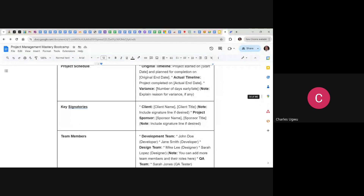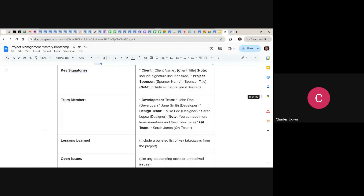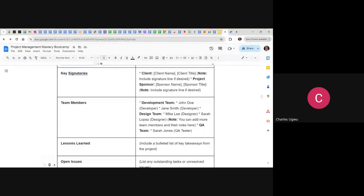Then, key signatories — who authorizes this project? Capture the client's name, title, and signature line if desired, and the project sponsor's name, title, and signature line. Then capture all team members who participated. Under the development team: John Doe, developer; Jay Smith, developer. Under the design team: Mike Lee, designer; Sarah Lopez, designer. You capture all team members within this project.